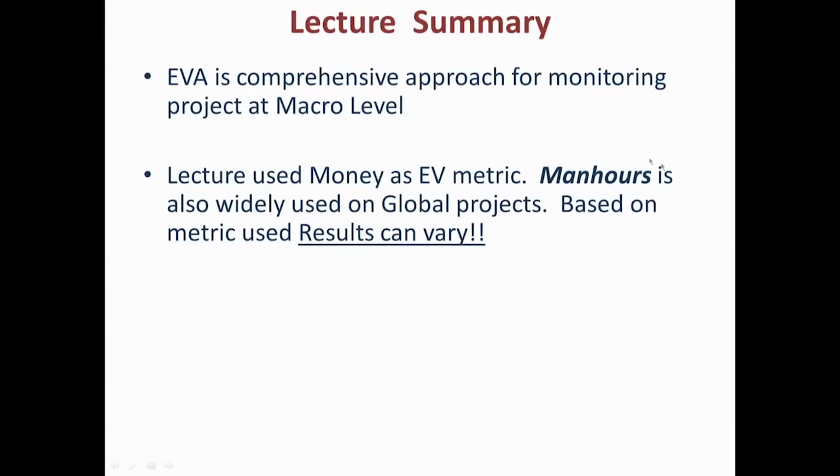So in many global projects, man hour is the base for your earned value metric, but most projects in India that I have seen are using money, because from the early years we have kept track of money more than man hours, because our labor is considered to be cheap and we might not pay by man hours. But please realize that both can be done, and today, with increasing costs in labor, man hours is becoming more important, and we should also be able to work with a man hour metric.